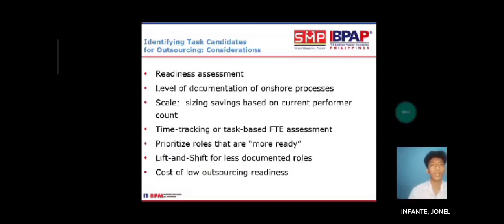Identify task candidates for outsourcing consideration. Readiness assessment: level of documentation of onshore processes, scale, and savings based on current performer count, time tracking, or task-based FTE assessment. Prioritize roles that are more ready. Lift and shift for documented roles, cost of delay, outsourcing readiness.